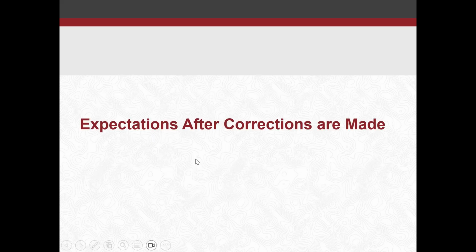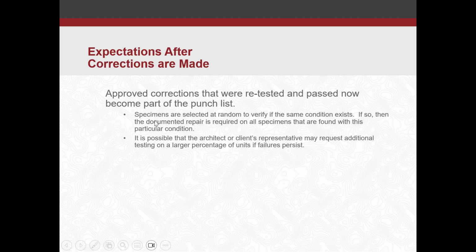So what are the expectations after the corrections are made? So approved corrections have to be retested. Once retested and passed, they now become part of a punch list.